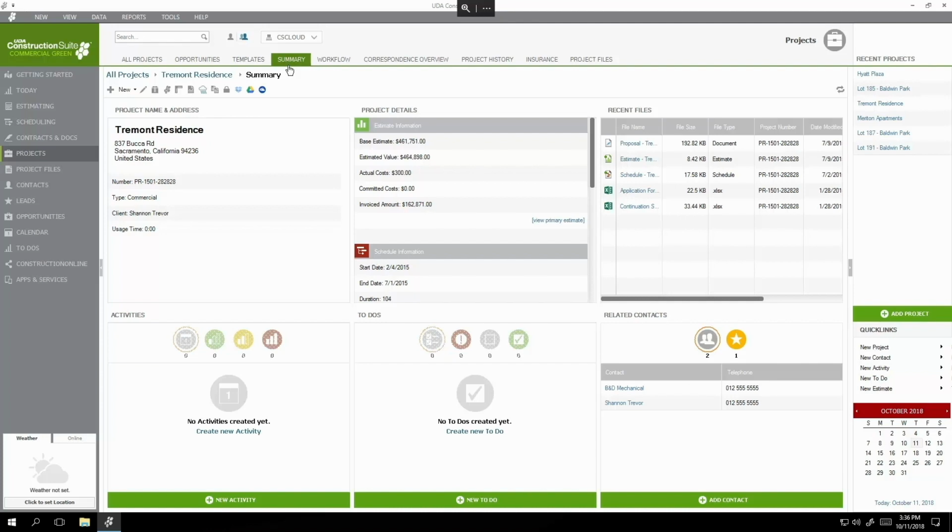I have worked with a number of companies who do find that very, very handy because the last collection of tools available in the first workflow is getting all of the paperwork together for the handoff. The project manager is going to need a checklist of items available here where maybe we need to know the selections that have already been approved, who we're going to contact, all of the safety information that we've got for the job, when we've promised to start the project. All of that would be part of, in my mind, the handoff package.